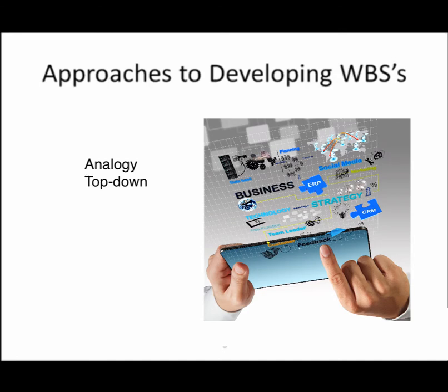The top-down approach, the one that we're going to use, here's where you start with the largest items of the project, and this is how it was used in the previous examples. You break them down into successive, smaller and smaller pieces of work until you finally get to the task that you can describe in detail.